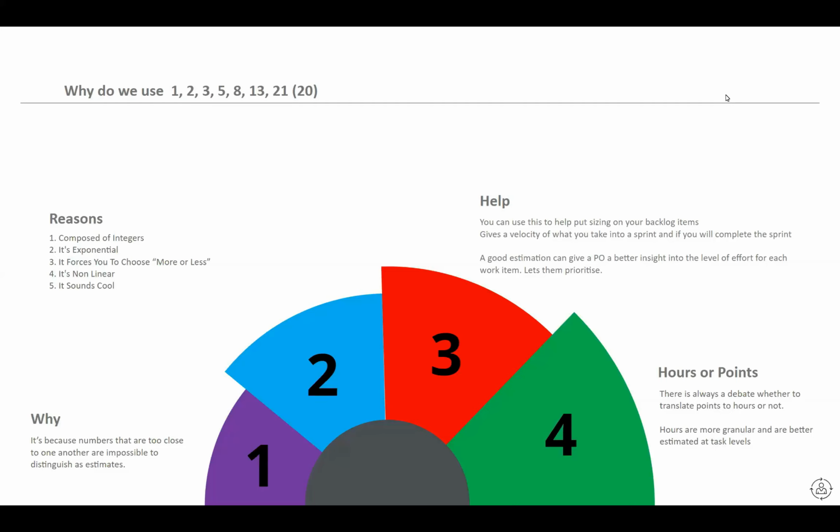Hey. So I would want to discuss that we are currently using the Fibonacci series. So as Farhan said, at the start it is very difficult to make teams understand what 2, 3, 5, 8 stand for. So starting we had some difficulty, but as Usman Saeed mentioned, we educated the teams a bit, that you can consider 1 to stand for making a skateboard, 2 can stand for making a bicycle, 3 for making a car, and 4 for making a bus, and it goes on like that. Yes, exactly.